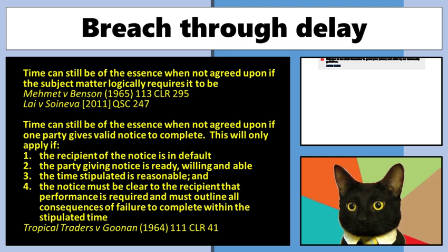Now, the other thing to note with time being of the essence is that you can, in situations where you haven't talked about it, actually tell the other side from this point forward, we want it to be of the essence. We didn't give you a time to stipulate as such, we said a reasonable length of time, but we want from this point forward to really encourage you to hurry up.